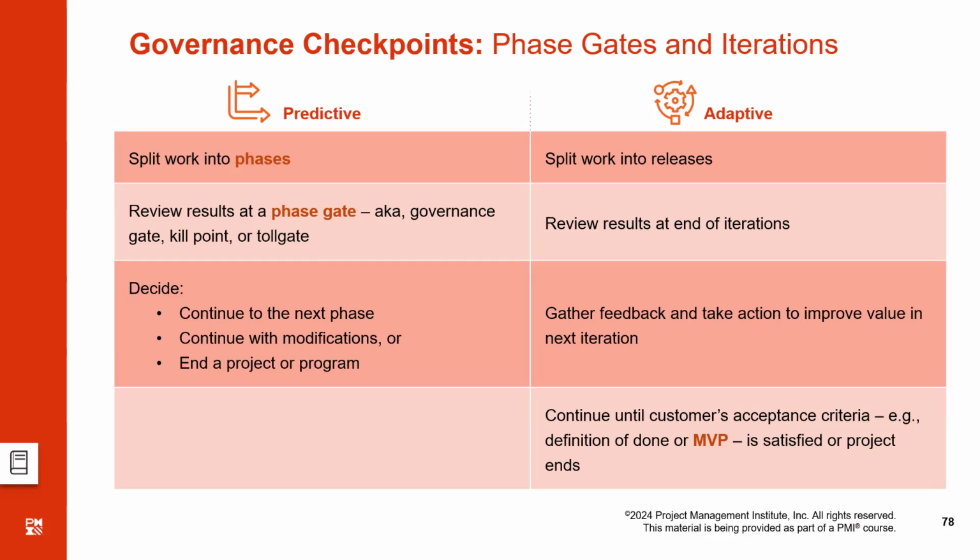When a phase ends and we deliver something to the customer, before that, the governance board comes in. They inspect everything and check that whatever we are supposed to do, we have done it. The deliverable is ready to be handed over to the customer. If they have no other observation, they will allow us to move to the next phase. This is called a phase gate.